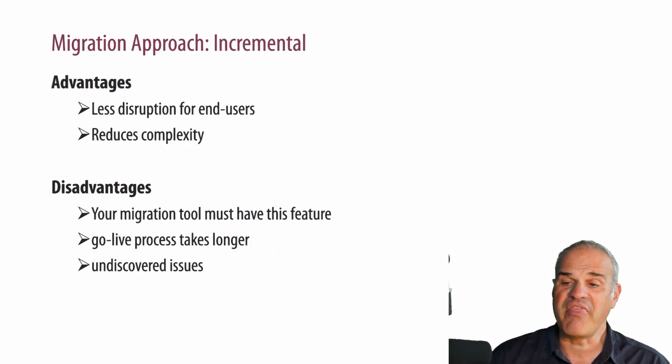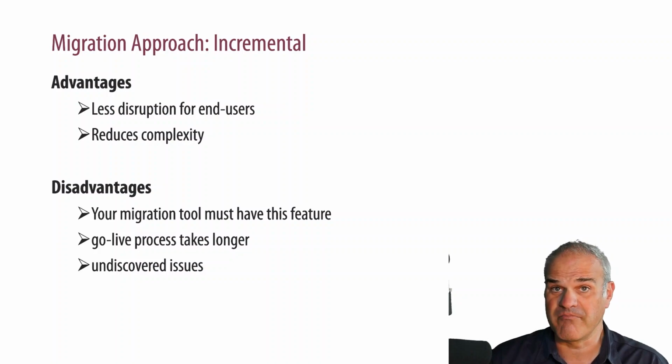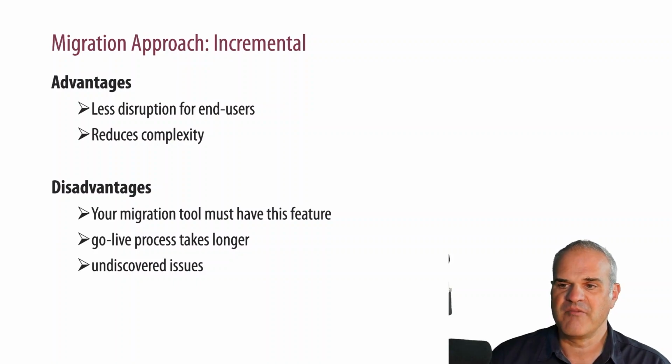And then there is a very popular approach called incremental migration. This is reducing complexity because the end users can still work on the source tenant, but also on the target tenant. And the tool will migrate and would sync between source and target tenant. Here, you need to buy or to get a tool. It takes longer, and maybe you are going to run into issues which you didn't plan because the sync is going to offer issues which you didn't scope. But for large environments, that's definitely one of the most recommended approaches here.